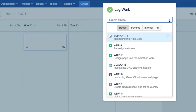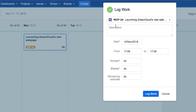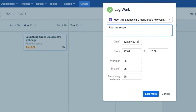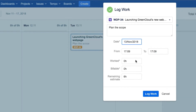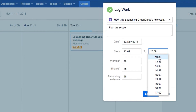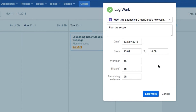First, you need to select a Jira issue to which you'll log your work, and add a description of what you worked on for that issue. The date is filled in for the day that you selected, but you can click here and choose a different day if you like. If you need to specify which hours of the day you worked on this issue, you can do that here, or just add the number of hours that you worked on this issue if it doesn't matter when.